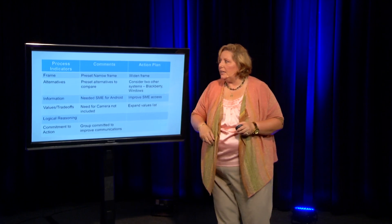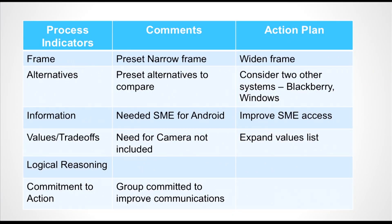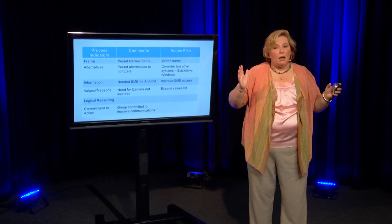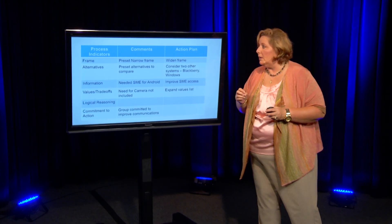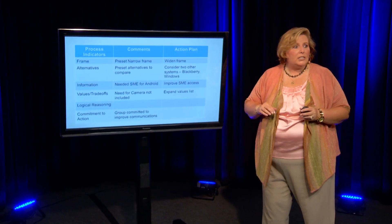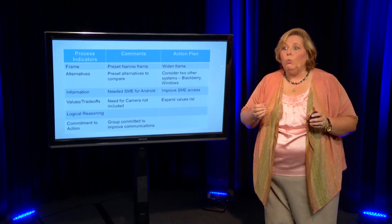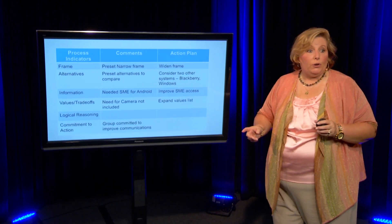First, we're going to look at our process indicators. These are the gaps that we found. We found that the frame, even though it was predefined, was very narrow. One of the lessons learned is that at our next opportunity for decision planning, we need to widen our frame and think more globally in terms of what our problem is. Secondly, we need to expand our alternatives. Even though they gave us a very narrow alternative set, would there have been harm in exploring it further by looking at BlackBerry or Windows — or maybe another alternative someone could have brought forward?